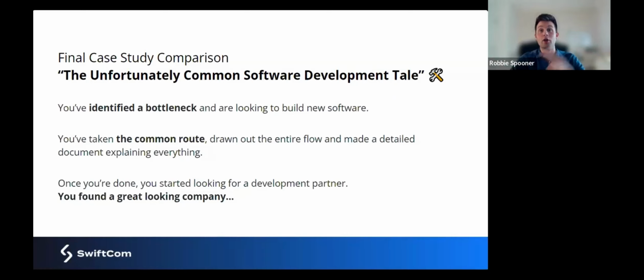And that's when it's unearthed that, oh, okay, there's technical complexity that we didn't foresee and we're figuring it out. And very quickly, those 2 weeks turn into 4 weeks, into 6 weeks, because they're now readjusting this process that they really didn't accommodate these kind of unforeseen things. And you end up with either no working software, very delayed software, or very buggy software because the process hasn't adjusted for it.